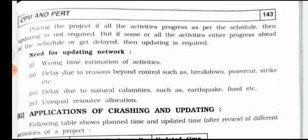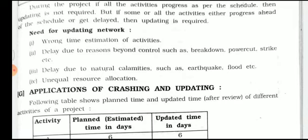The need for updating a network arises due to: first, wrong time estimation of an activity; second, delay due to reasons beyond control such as breakdown, power cut, or strike; third, delay due to natural or climatic events such as earthquake, flooding, etc.